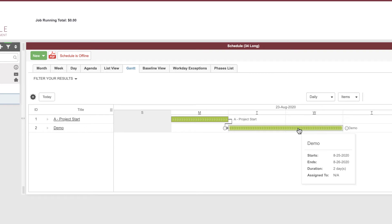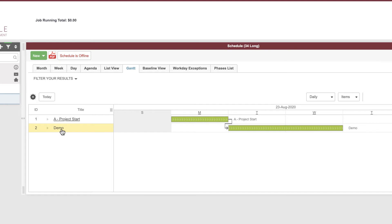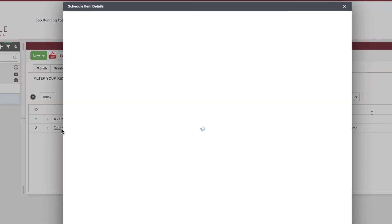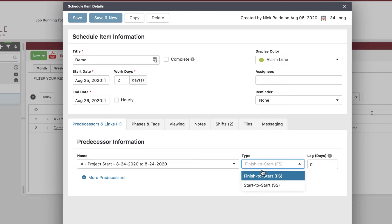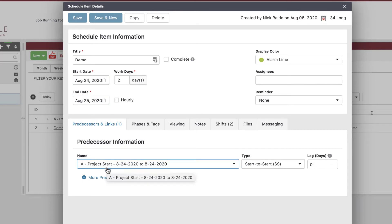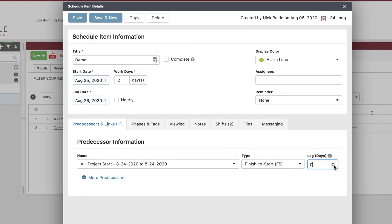We have a problem — project start is Monday but demo doesn't start until Tuesday. That's not right; I'm going to demo the day I start the project. What we can do is change the relationship. This is a finish-to-start by default, meaning once the first one finishes, the next one starts. We could change this to a start-to-start, which says as soon as my project starts, I start my demo. Or we could do a finish-to-start with a negative lag of one day. Either way accomplishes the same thing.